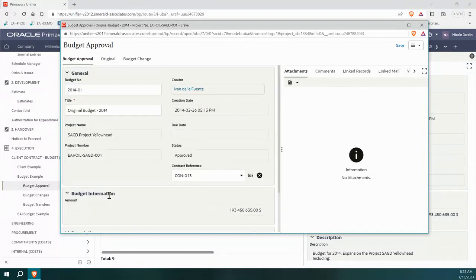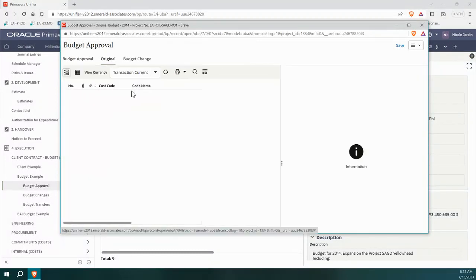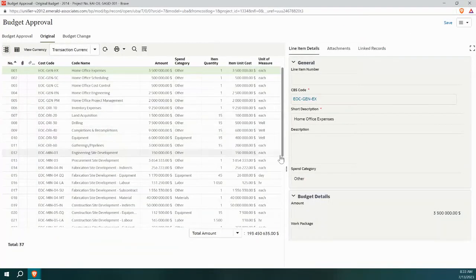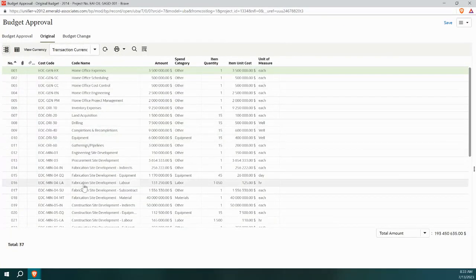We can have many fields explaining a variety of things, but the big important piece, of course, is the cost breakdown. Now, the cost breakdown can be unit rate or lump sum, so you can see both. So in this case, we've got quantities, 15 at 100,000 for different land components that we're going out to acquire, and then some of these are lump sum items. Now you can see these items have a cost code against them. Okay, so this is how they're landing in that master cost worksheet.